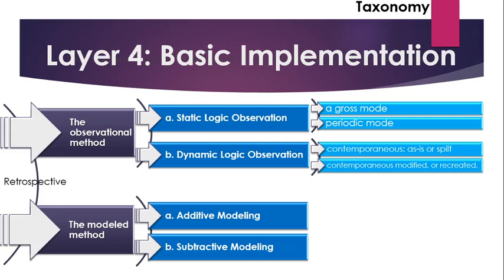However, the as-is implementation evaluates the differences between each successive update in its unaltered state, while the split implementation bifurcates each update into the pure progress and the non-progress revisions such as logic changes. The purpose of the bifurcation is to isolate the schedule slippage or recovery caused solely by work progress based on existing logic during the update period from that caused by non-progress revisions newly inserted but not necessarily implemented in the schedule update.